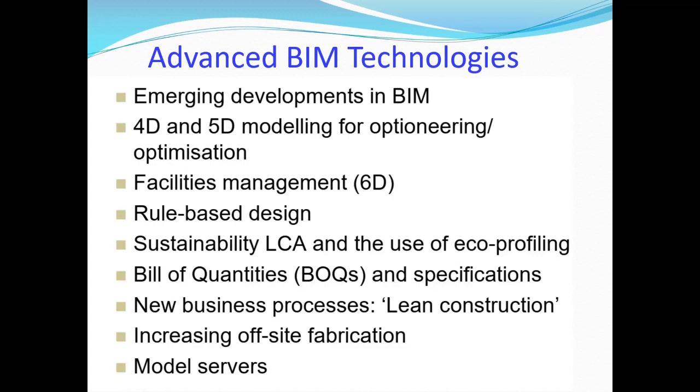So you see in the traditional drawing, how long does it take to calculate everything? We have to include not only structural things, but also architectural walls and so on. How long does it take to do the calculation? We may also make human mistakes. But in the model, it's one click. With one click, you can find out everything. Day to day in our project, we are doing the quantity takeoff very fast. We haven't gone into the rebar quantity takeoff yet, but concrete quantity takeoff is very common.